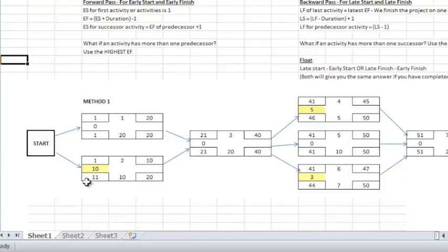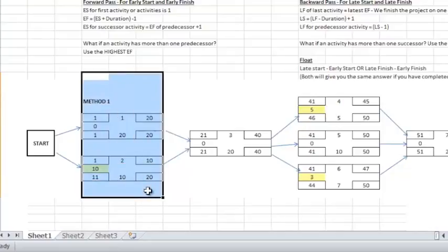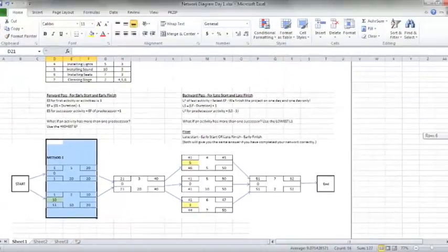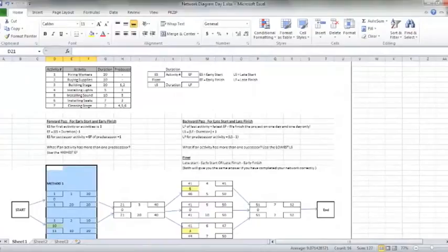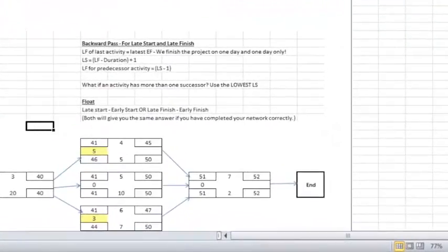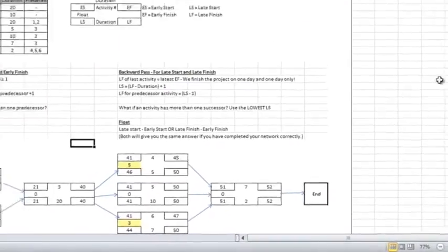And now you can see here, if you've been wondering why some of this was highlighted, that's because I had left some of the highlighting in. The items that have float are actually shaded in yellow on here. And so if you just now go back to the beginning and we look at these first two activities, activity 1 and 2, they both could start at the beginning, but one took 20 days and one took 10 days. Right away, you probably knew that that meant that the second activity, which took 10 days, which was buying supplies, probably could wait a few days, because what's really driving the schedule was the 20 days we needed to take to hire the workers. Then, since activity 3 is next, and it is the only next thing, it makes sense that that's the critical path.